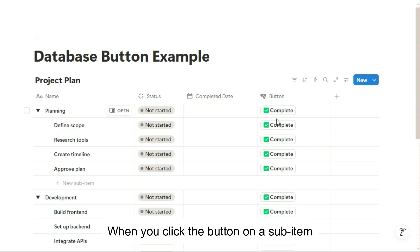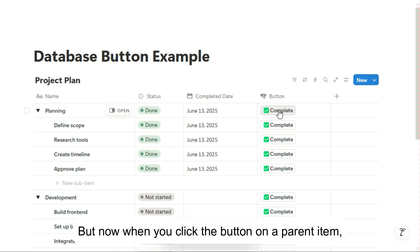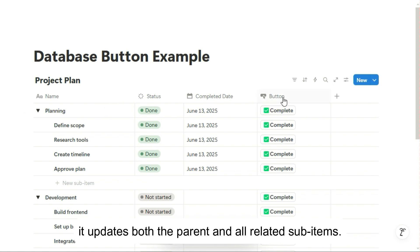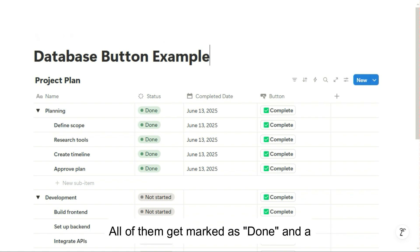When you click the button on a sub-item, it works just like before. But now when you click the button on a parent item, it updates both the parent and all related sub-items. All of them get marked as Done and a completed date is set to Today.